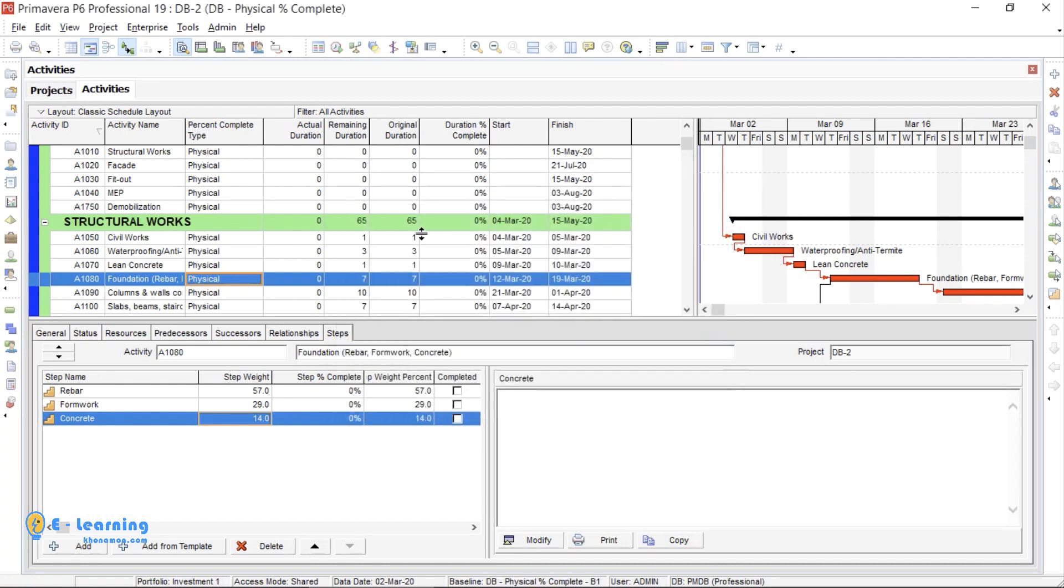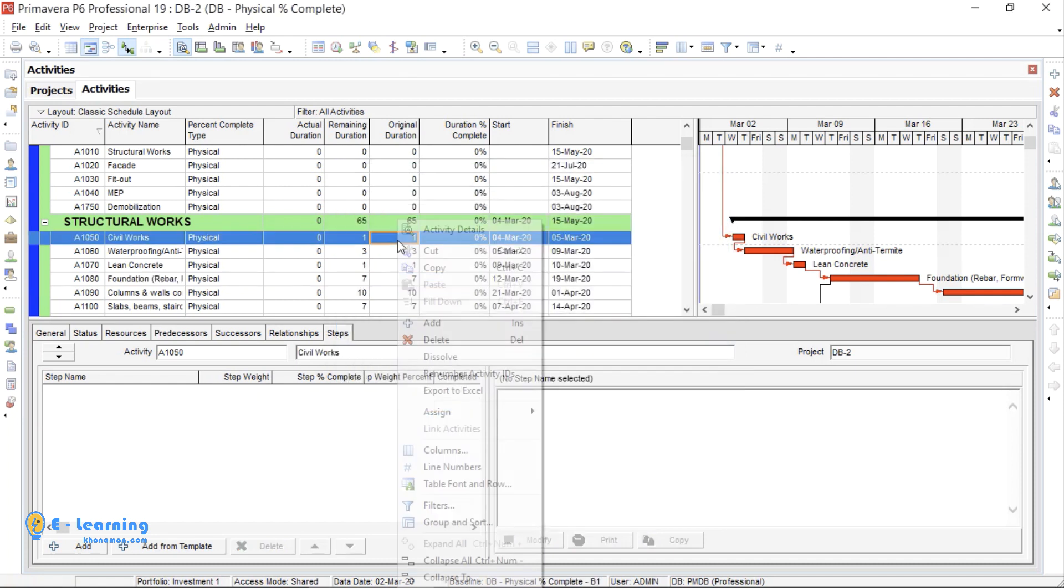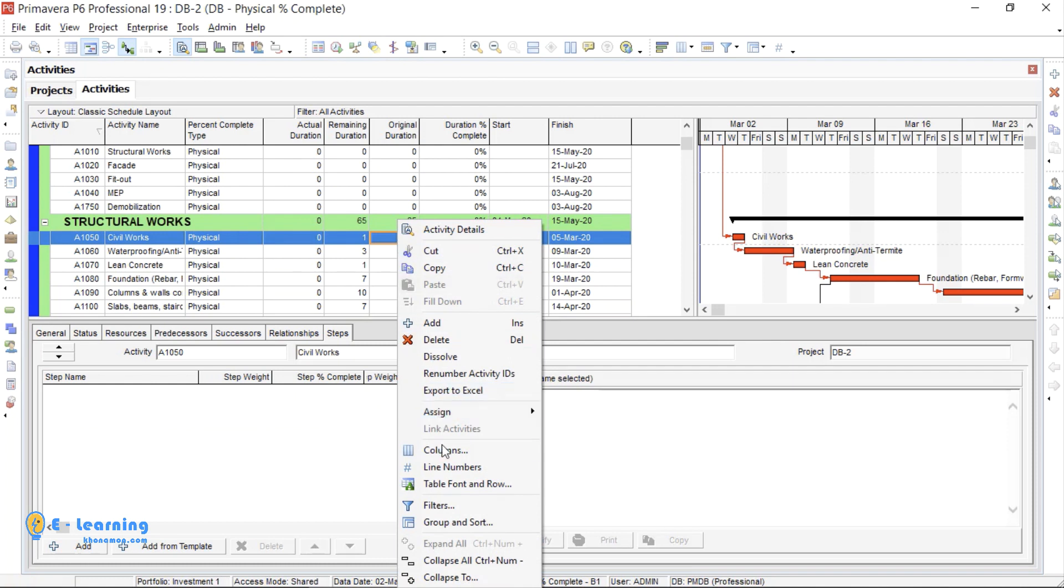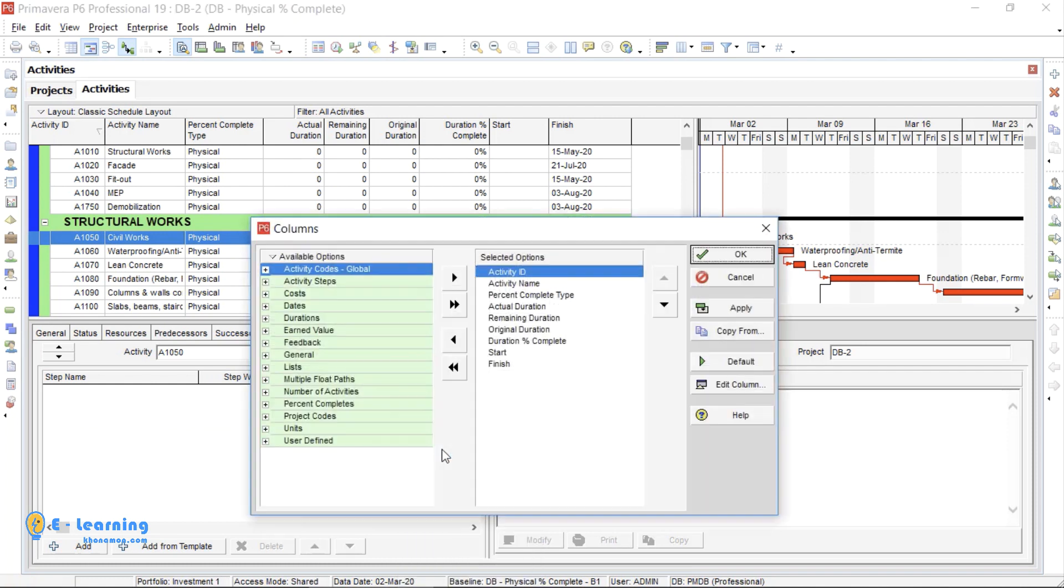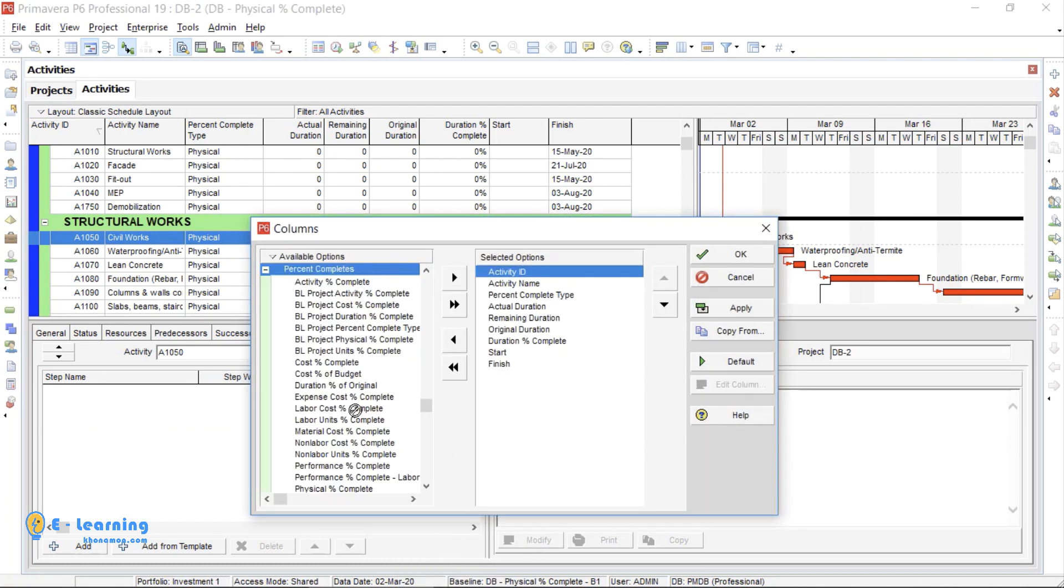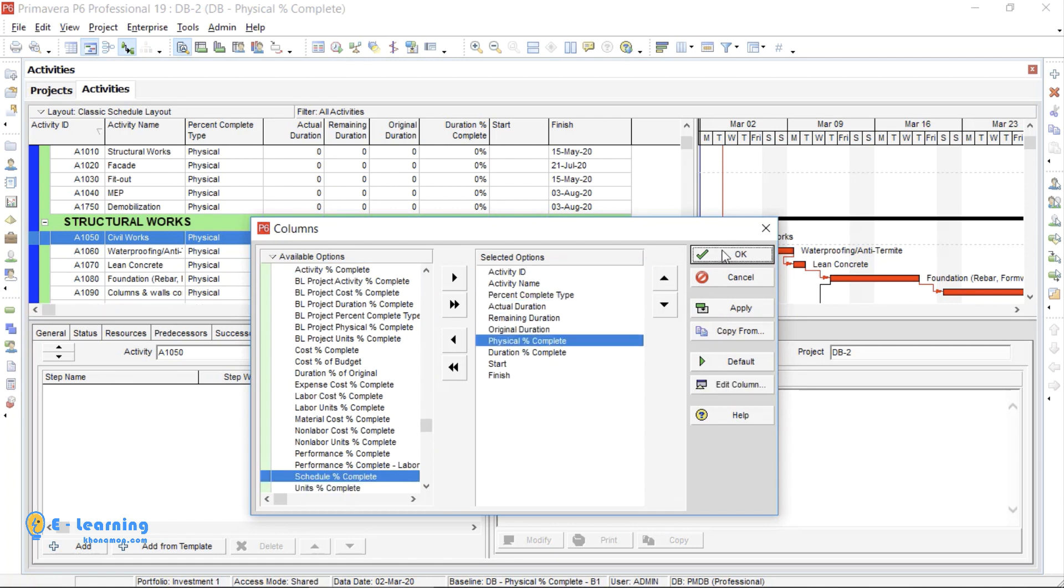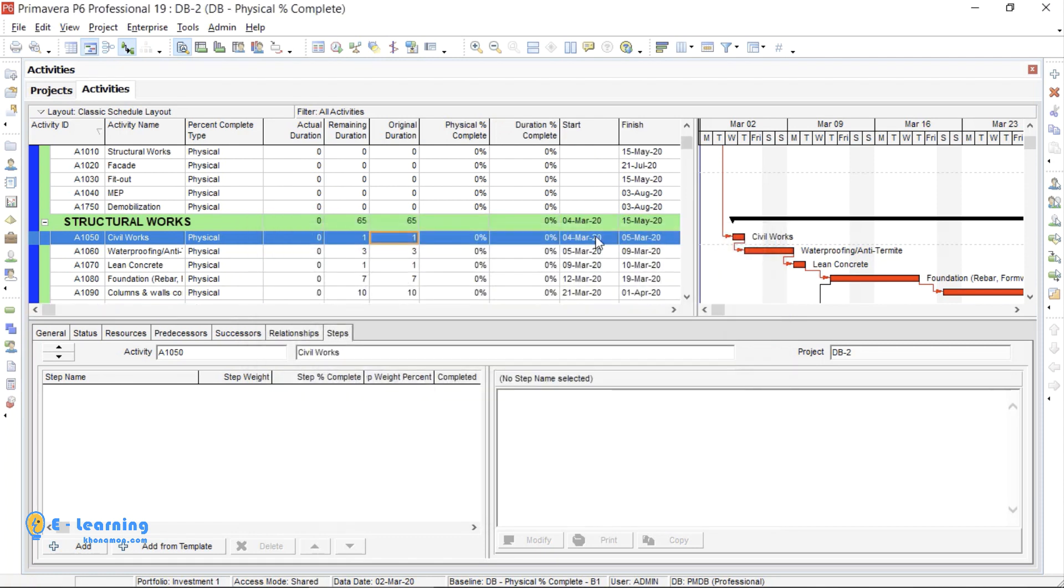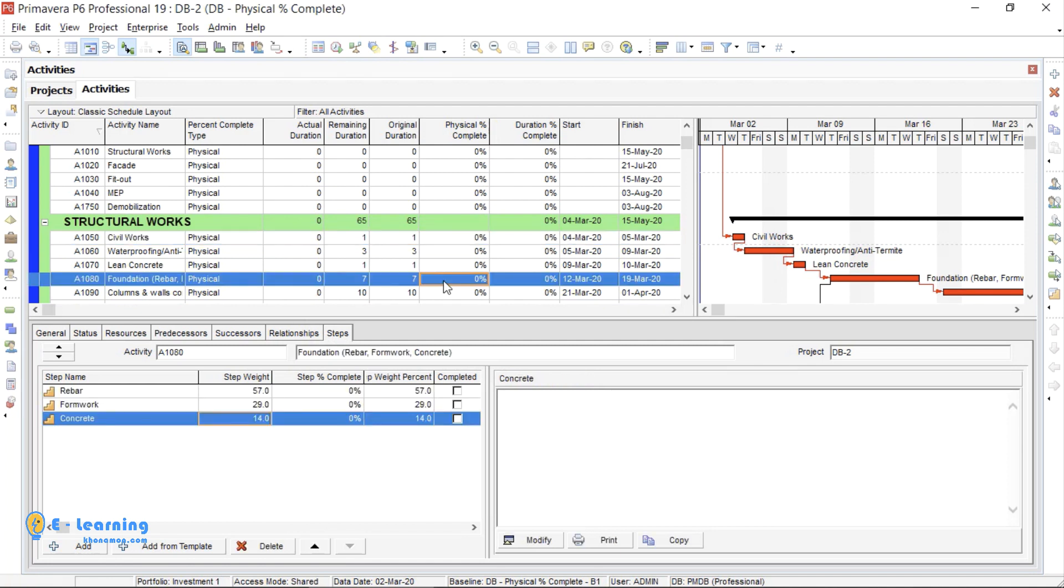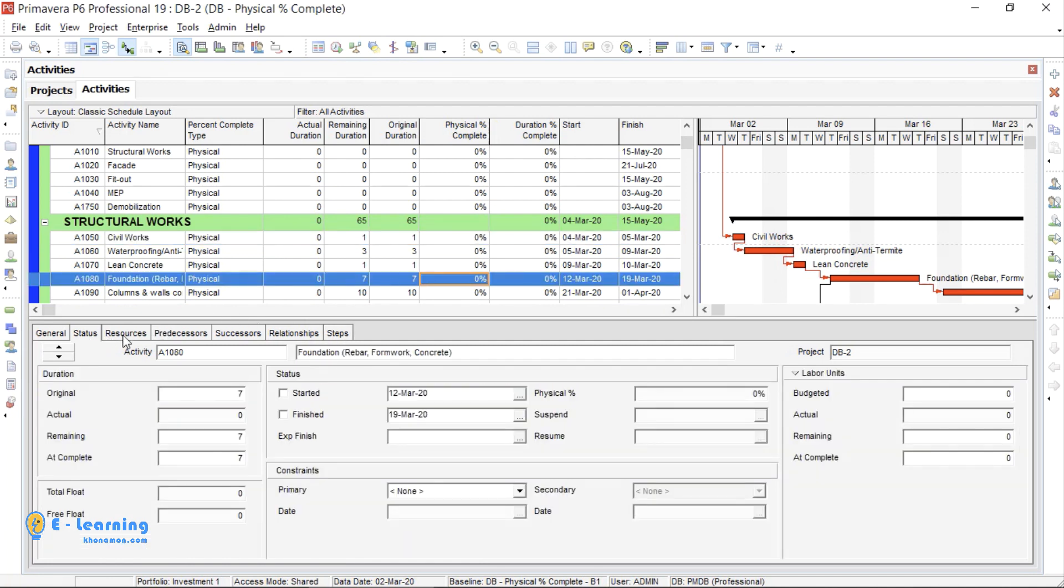Now, for seeing the result, go to Columns, Percent Complete and Physical Percent Complete. For example, 20% of Rebar has been finished. First, I go to Status, click on Start, then I go to Steps. Here, first the previous activities must start, then activity by activity we will reach to the foundation.